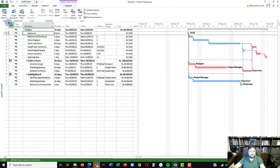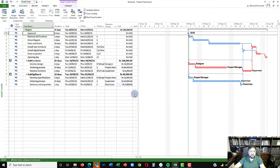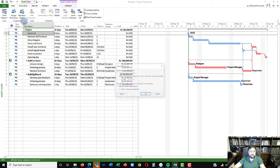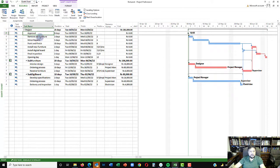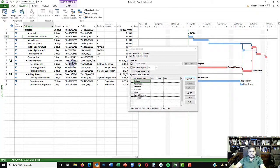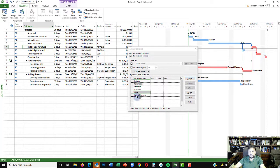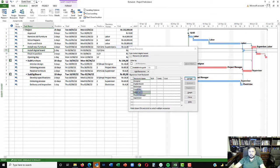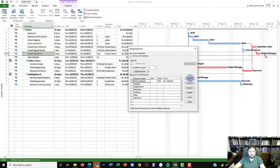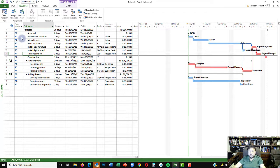Back in the master project, assign the resource pool there as well by going to Pool and selecting it. Now resources are available. Assign labor to remove furniture and minor repairs, labor to paint, supervisor and labor to install furniture, and labor and electrician to install digital board. Final inspection goes to the project manager. With all resources assigned, you can see the total budget rolling up as a consolidated figure.